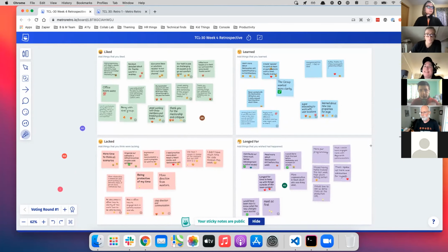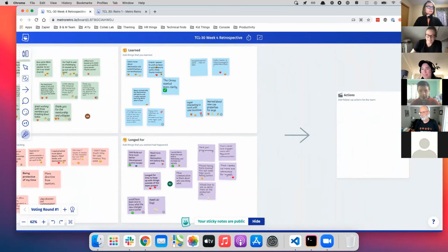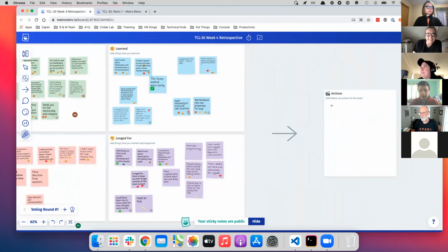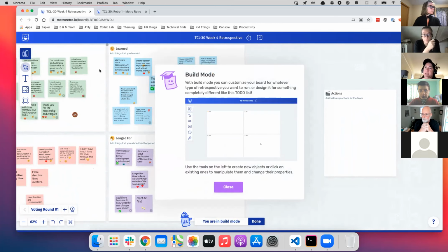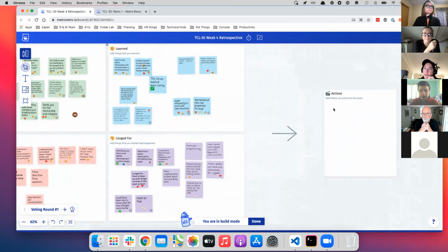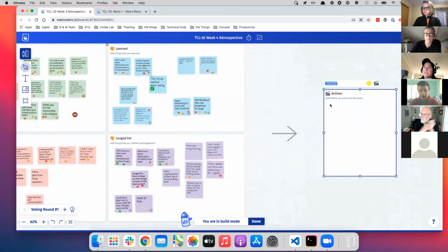Yeah, Megan, you're... for me, it's like I press the button and it never seems to unplug. Maybe it's along the lines of communication, but I felt like we did a pretty good job of breaking things down into manageable tasks, but then somehow it became bigger. I don't exactly know how we got there. Maybe as we do these things, we're realizing they're actually much bigger. So maybe we should communicate to revisit and break those parts down too.